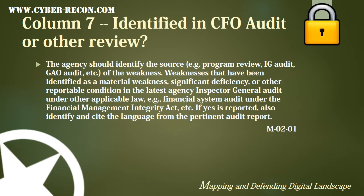Column 7 is used to identify how the weakness was discovered. According to GAO, the agency should identify the source of the weakness — weaknesses identified as a material weakness, a significant deficiency, or other reportable condition in the latest agency inspector general audit under applicable law, including financial systems audits under the Financial Management Integrity Act, should be noted. If yes is reported, also identify and cite the language from the pertinent audit report. Basically, this column will identify where the weakness was identified, which could also be a security assessment as part of the authorization process.